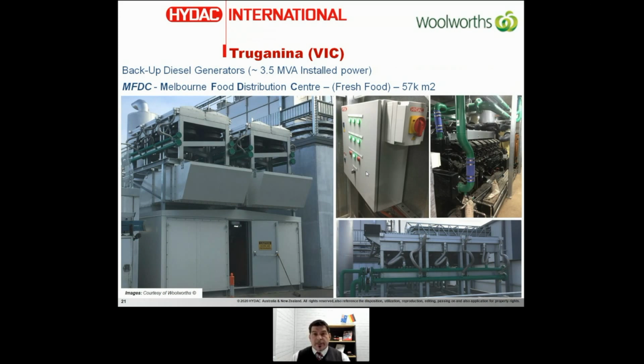And I like to stretch this point because when you commission a system like that and the same brand is responsible for the cooling package, for the diesel filtration, for the electrical junction box, for example PLC or condition monitor, well, I can tell you the commissioning goes very fast because you deal only with one company, you deal only with one entity. And so this is the feedback that I got from the market compared to other projects.